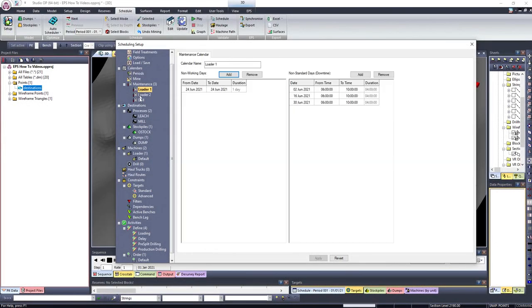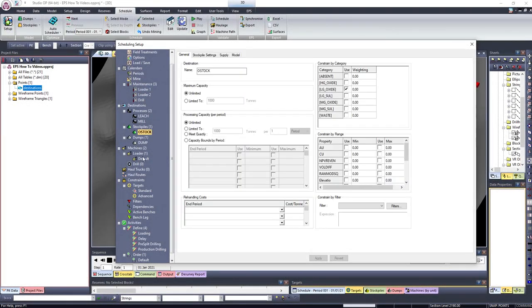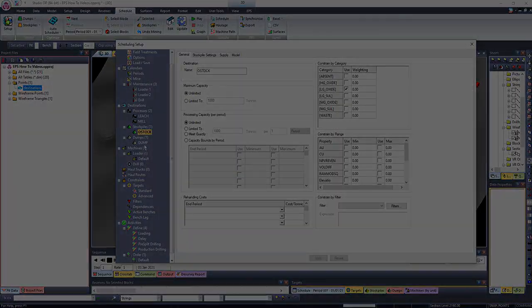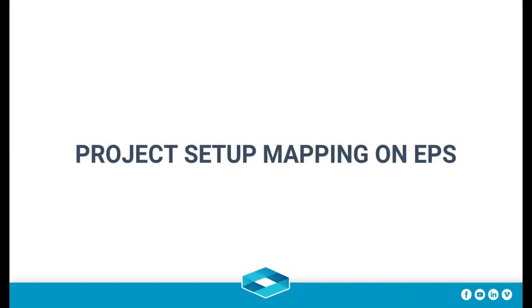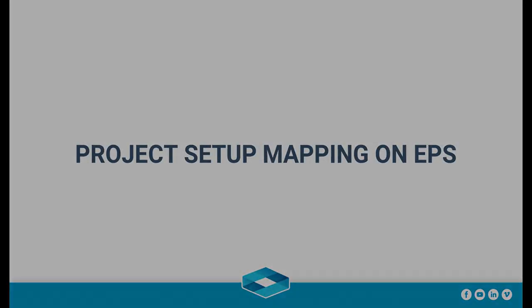It is possible to define all the schedule setup in Studio OP and export it to EPS or choose to define all the schedule setup in EPS. If you choose to set up completely on Studio OP and export to EPS, this is how the setup will be mapped on EPS.